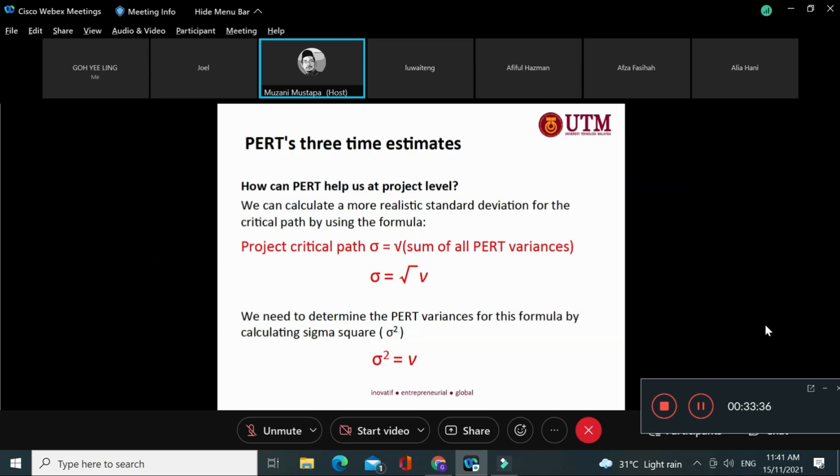If you exceed the time you plan, it will burst the network. Meaning, if you can complete that particular project in 32 days, but you extend the critical line by 3 days, then 32 days is no longer achievable. So you have to crash the network again and then do the calculation and so on, right? So that's what it tells us about the critical path line.